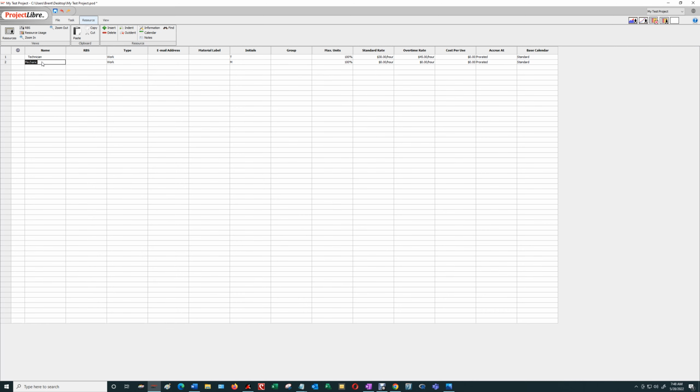And then we have another resource here, a mechanic, who is also work. And I'm going to put in here that he's $50 an hour. And the overtime rate is $65 an hour. Nope, $75 an hour. Time and a half would be $75 an hour. I'm going to also add some other resources here. For example, I'm going to add in here a part that is needed. That is going to be considered material, and I'm going to put in here a cost per use of $500.